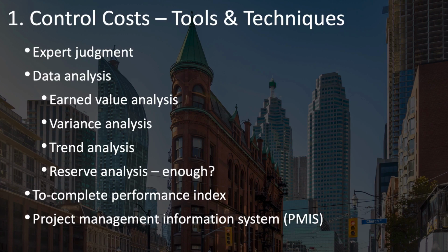We also have the To Complete Performance Index, which is part of your earned value analysis, which is used to measure how much more it's going to cost to finish the remaining work. And your project management information system can be a valuable tool, especially as it supports cost control and earned value analysis.